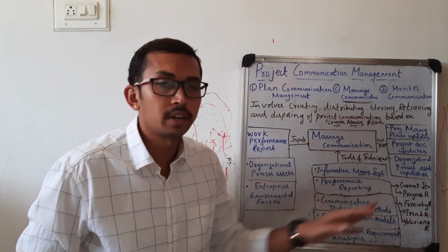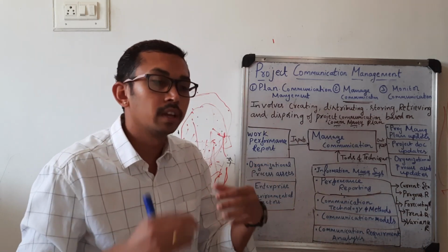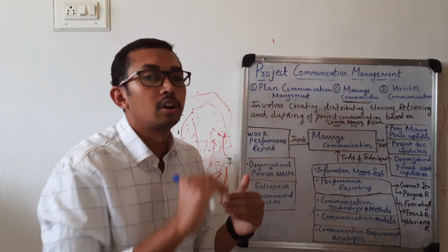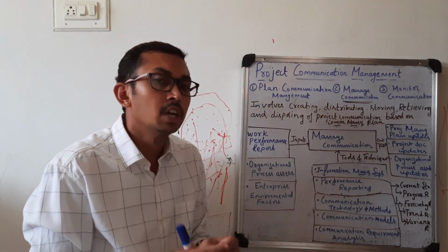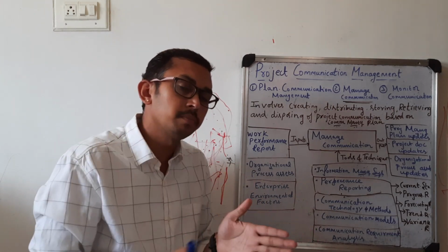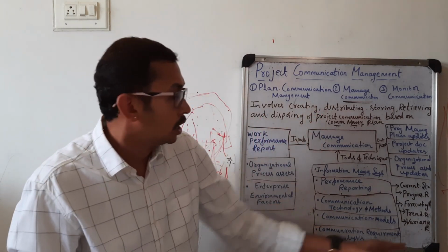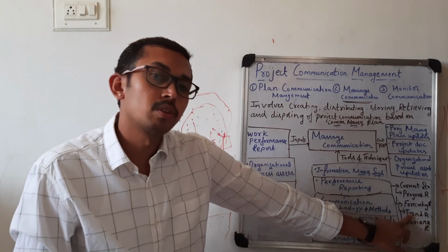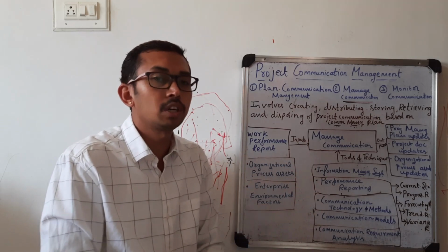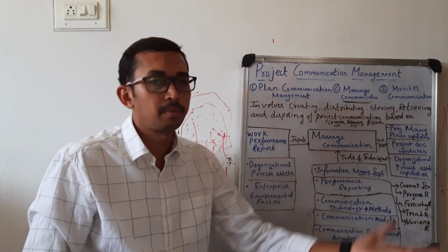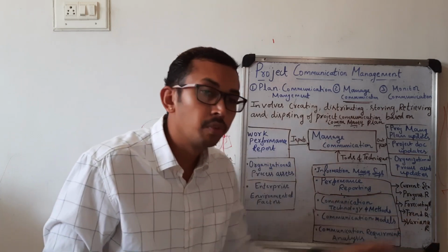What is the use of trend report? It shows you whether your process has been improved or not. If you are not going to maintain that proper data, what happens? You're going to make the same mistake again and again, so the process is not going to improve. That is why the trend report is very important. It is going to compare the existing project with the previous project, same type of project in the same time durations.